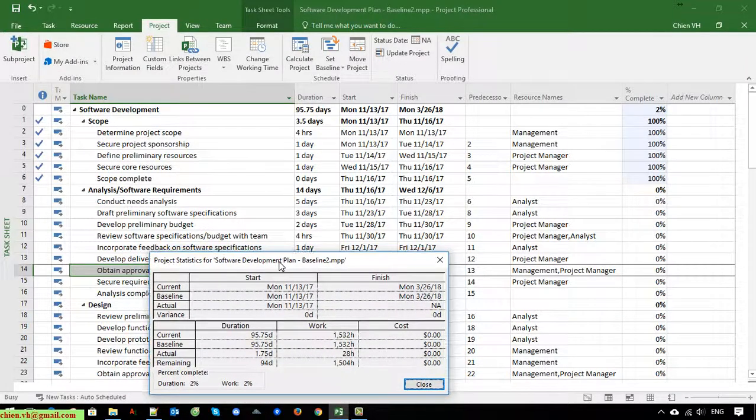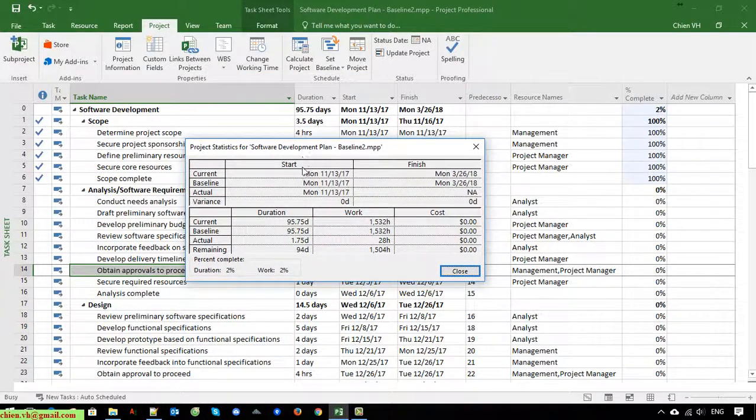I mean change if, for example, you are going to add some new task into this project timeline. It will increase the development time for the project, meaning the finish date will be different from the baseline. For now we still do not see any issue. And you can see here when you take a look at the duration, we have some difference.